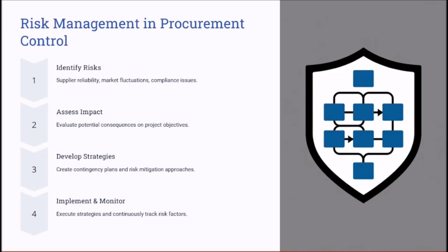What else can we list as part of procurement? We have the logistical risks, which means delays due to transportation or supply chain disruptions. Maybe you are dealing with a vendor you have requested devices from in external countries or from external resources, and you have a tight deadline. So these delays, in terms of logistics issues, transportation supply, or chain disruption, could be considered one of the important risks that you need to account for.